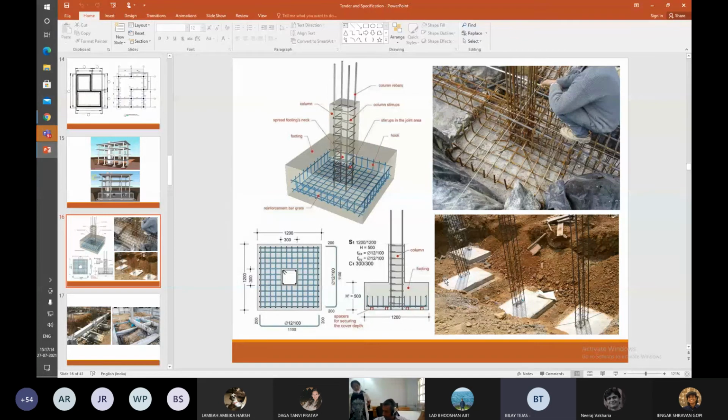Yeah, so then it would be like providing and laying of RCC. You will write the mix for RCC. According to you, what is the kind of mix that is required for an RCC structure? I think it's 1 is to 1.5 is to 3. बराबर है, perfect. 1 is to 1.5 is to 3 is the perfect RCC mix considering the new seismic code that we have for RCC structures. You all are good.